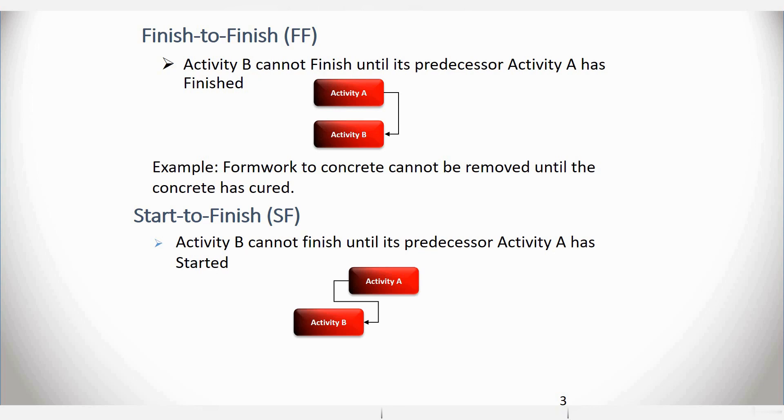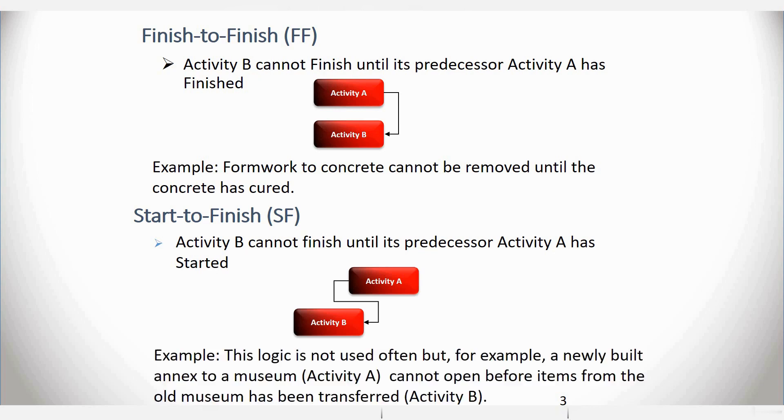This might be a little difficult for you to understand, but consider this example. Say we have a newly built annex to a museum, which is Activity A. Now this museum cannot open, even though it's constructed, before items from the old museum has been transferred, which is from Activity B.